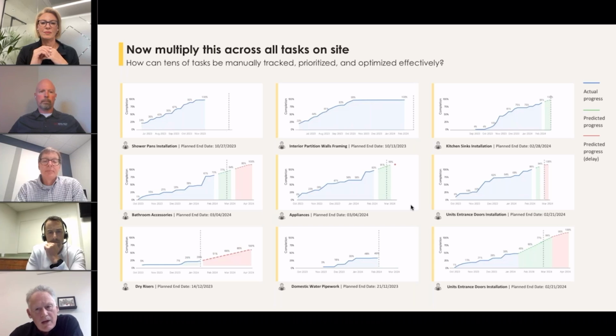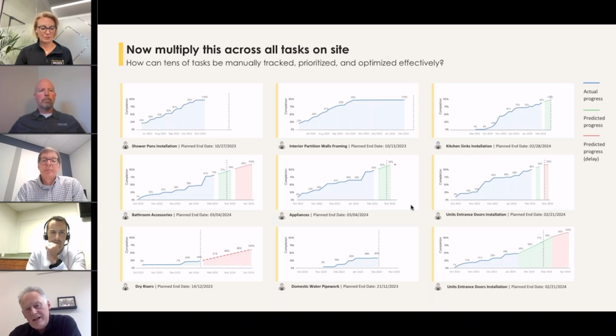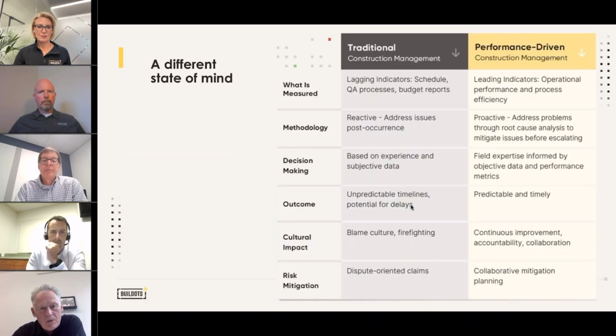We were talking about a customer today that has written to us a really great response saying, you identified early that the drywaller was going to be 6 weeks late, and we believe that saved us 2 weeks on our actual critical path and our end date. So recognizing it was not going to be ultimately 6 weeks, but we picked that up earlier through this pace control and out-of-sequence working. So it's that level of detail that we're looking at.